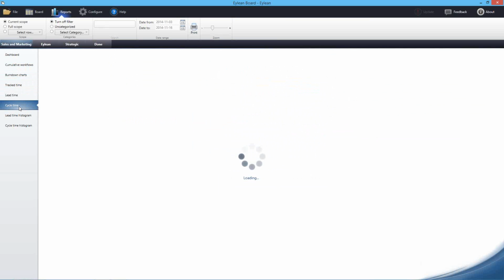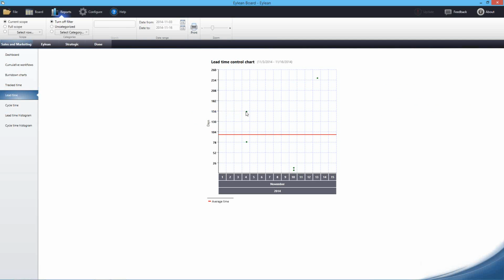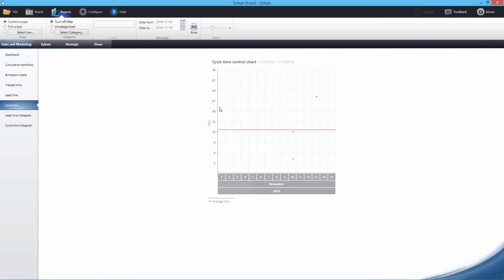That's for sure. And lead time shows the metric from the time the item was created until the item was delivered. Cycle time shows when the item was started until it was finished. By started, I mean it got into development, production, or something like that. It just came from planning to the work in progress phase.